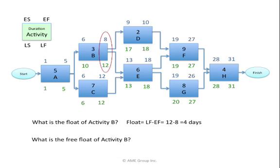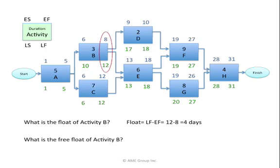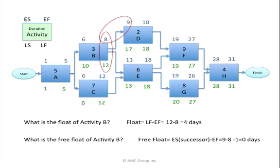Another question: what is the free float of activity B? Free float is how much an activity can slip from its early finish before it affects the earliest start of any successor. The free float of activity B is how much B may slip from its early finish of day 8 before it would affect the earliest start of activity D at day 9. The equation: 9 minus 8 minus 1 equals 0. This means if B slips at all, it will start to eat into D's float.